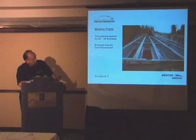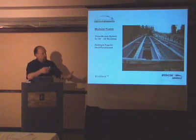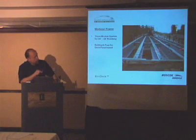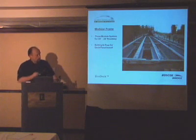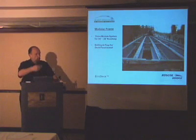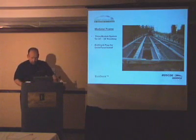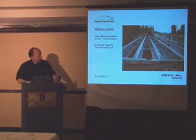and downsize it. So again, there's 3 modules, and it was a bolt together splice out here, where this whole modular approach comes in, and then we just start placing the deck panels out here. The deck panels aren't even required to be placed with a crane, because once you place a deck panel over here, if it's an excavator or a dozer, you can just walk your panels right on out and set them as you cross all the way across that bridge, whether it's a little 40-foot span or a 120 or 130-foot span.